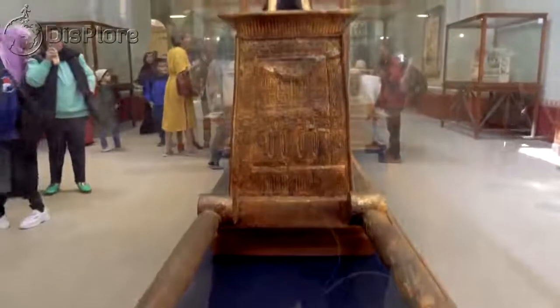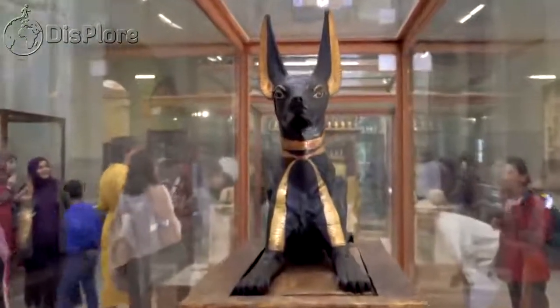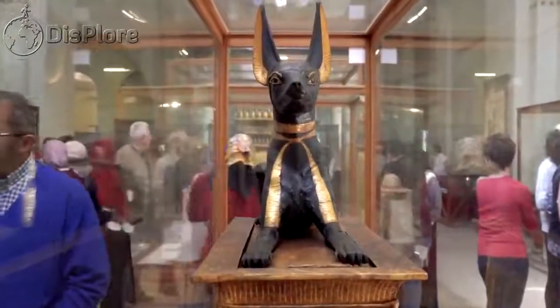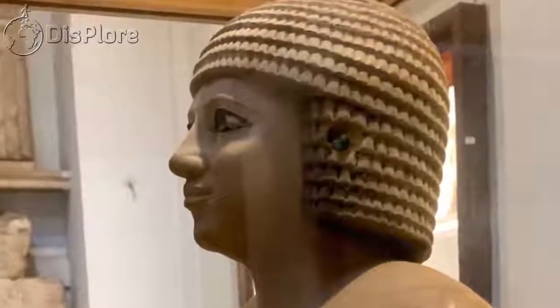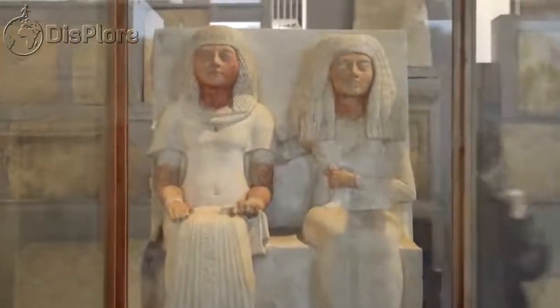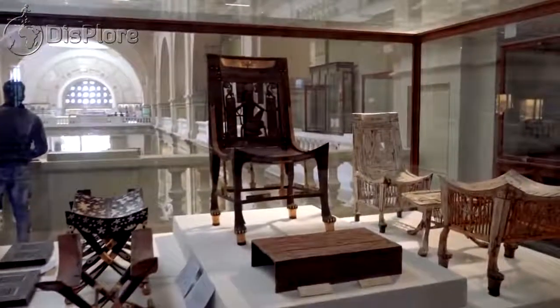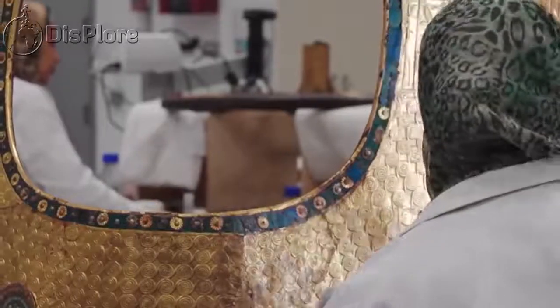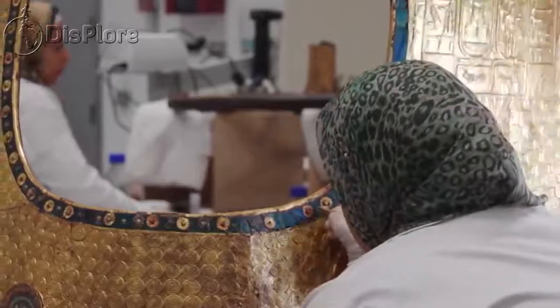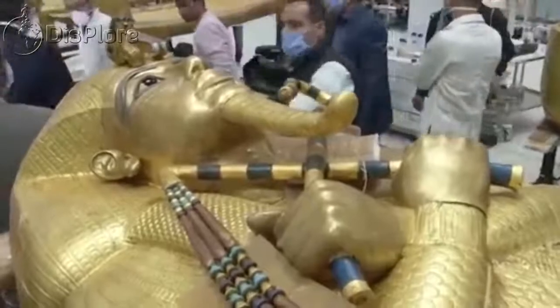Progress report on the Grand Egyptian Museum. The Grand Egyptian Museum is currently 95% complete as to date. A total of 55,137 artifacts from various Egyptian museums and archaeological sites have been transported to the Grand Egyptian Museum premises. Fully preserved are 47,722 artifacts, which have been restored in the Grand Egyptian Museum's warehouse. An international consortium is selected through an international tendering process to operate and maintain the services and facilities of the Grand Egyptian Museum. The contract is expected to be awarded in early May 2020.